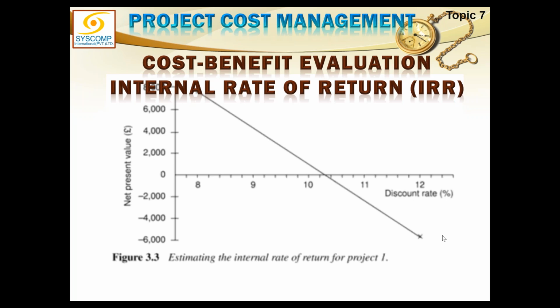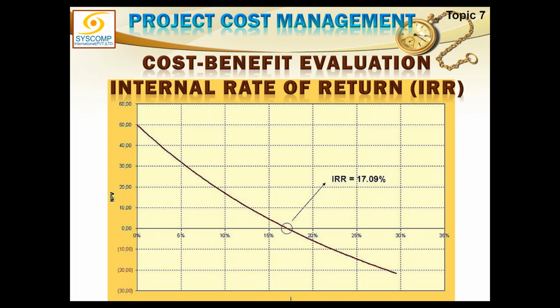So is it a straight line? Actually, no. This is actually not a straight line. If you look at it from the actual point of view, this is a curved line. But if I know 2 values and connect them with a straight line, I would be something ahead of that line, a little ahead of that line. So that brings me very near to 0. So I can subtract some value and I can get to my 0 value. At least it has taken me nearest to that value. So like in this case, the value is 17.9%.